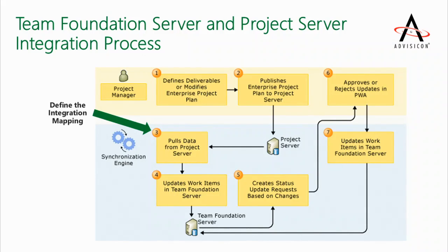Number 6 talks about approvals or updates. And remember, Project Server has, by default, the ability for the PM to say, well, thank you, Mr. Team Member. You just entered remaining work at 8,000 hours when you meant to put 80. And when you hit submit, it doesn't just roll right into the database and blow out your schedule. So you have an opportunity to review and approve that, not only from project to Project Server environment, but also from Team Foundation Server if that information comes in. That flexibility allows the PM to stay in control of their schedule even if pieces are being managed or edited in different places. And of course, finally, once we approve that, then it should rain back down to the work items in Team Foundation Server.